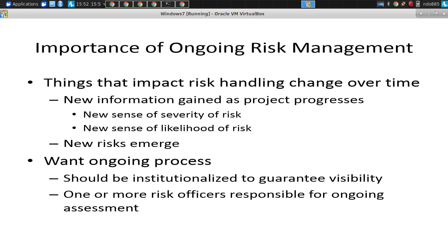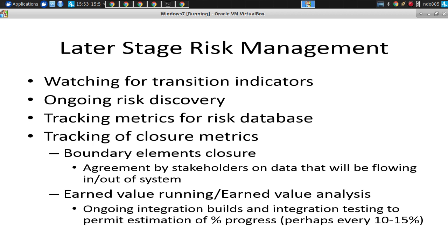Now, this sort of risk management should be done on an ongoing basis. There's two things you're looking for. Are risks you identified earlier emerging, or are new types of risks that you didn't anticipate earlier coming about? New types that weren't in your top 10 list, weren't at all being considered, are they coming about? So maybe late in the game you try integrating a new technology and that might bring in a new set of risks, okay? And this should be an ongoing process that's part of your planning for each new deliverable.